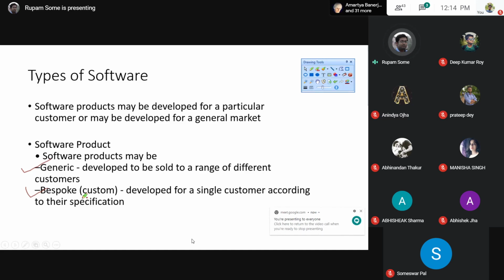But in industry, the approach is something different. Industry thinks from a different perspective. First of all, you have to grab the requirements in a proper manner. You analyze them to make sure how feasible that requirement is, whether it is implementable or not. If it is implementable, then you go for making a schedule, you make a team, you consider how many phases there will be, you make a time frame, and you make some milestones.